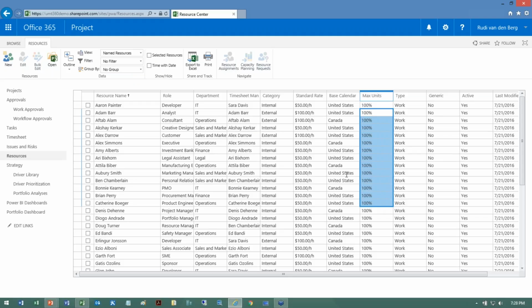You can also see that people work in different countries and therefore go by different holidays or different corporate holidays. You may also notice different blended rates for external resources, let's say $100 an hour, or maybe internal rates that default to, let's say, $50 an hour. Typically, we use blended rates. That's always very important to be aware of. The actual true rates are typically stored, of course, in an accounting system or an HR system.